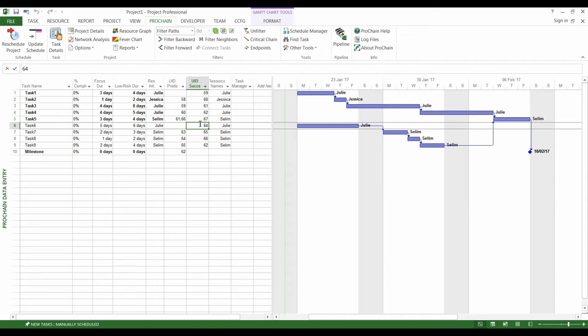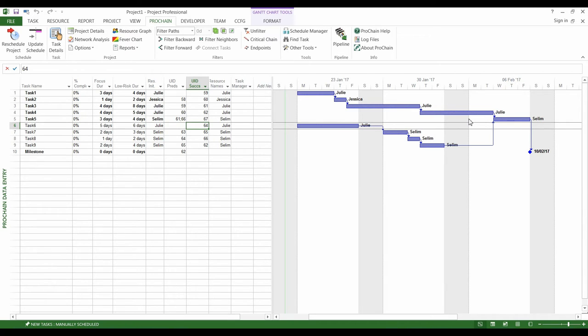Knowing these durations, ProChain can size the feeding buffers and the project buffer, which are used to mutualize the variabilities and protect the whole project rather than each task.